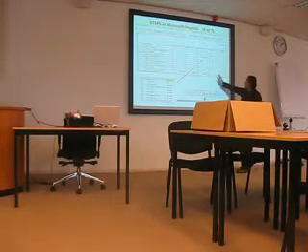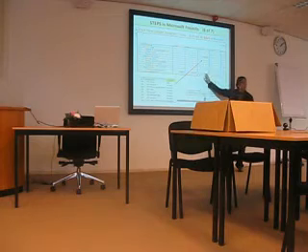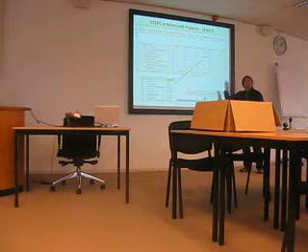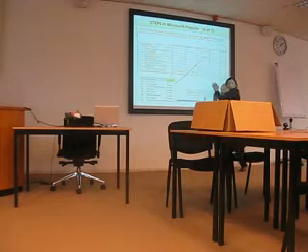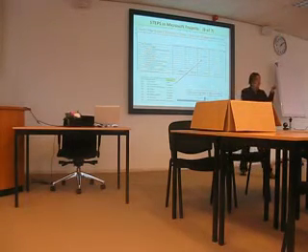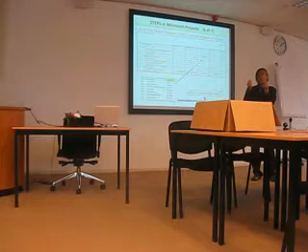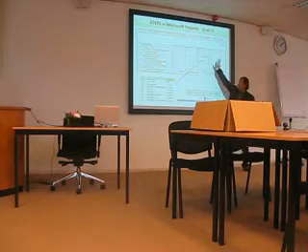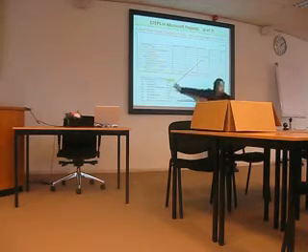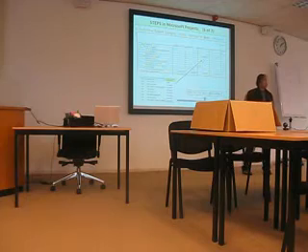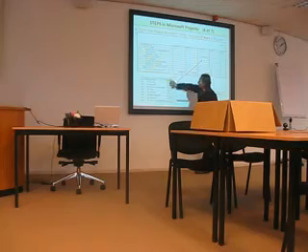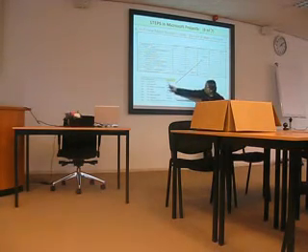It's a very different way of calculating the cost. This is very important, but you have to discuss with accounting people, finance people. Sometimes they do it like this, but we do it like this. And when we have a meeting, accounting people, operational, project people, different numbers. Because they have different treatment, how to treat this one. This is why, before we do this, please discuss with accounting people, finance people, how they treat this. Prorated or start or finish, this is very important. But in our case, we assume that all is prorated.